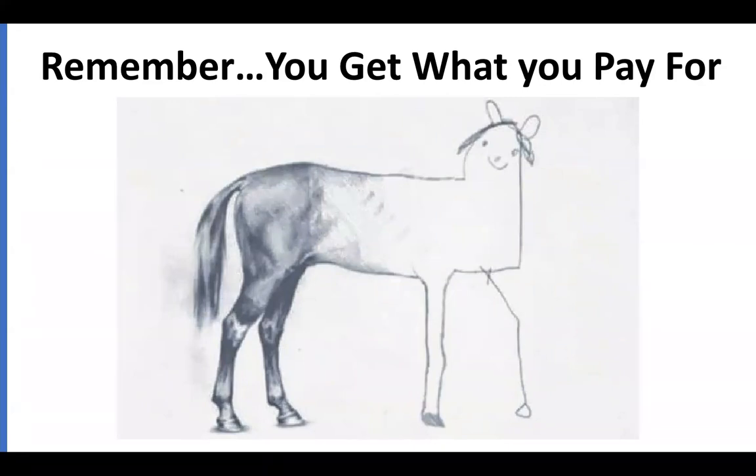And that's a project delivery, what some people might refer to as integrated project delivery methods, where it's not design, bid, build, which is where you typically have a process of designing the project, then you bid it out to contractors, then they build after they make a selection.